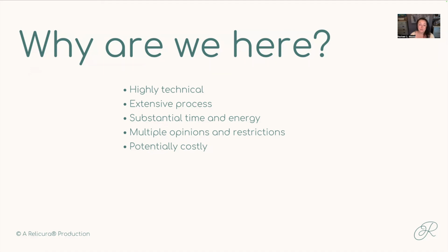It can be a very extensive process also, depending on your organization setting, depending on the opportunities and challenges that are present there, and any sort of budget, resource limitations or not. All of it will typically lead to it being a several months long process. And for larger agencies, sometimes you're actually looking at 1 year to 2 years. Especially if you're municipally funded, there are some very stringent procurement processes that you'll need to go through, which just adds time to it. So something to be aware of. It can be a very long process.